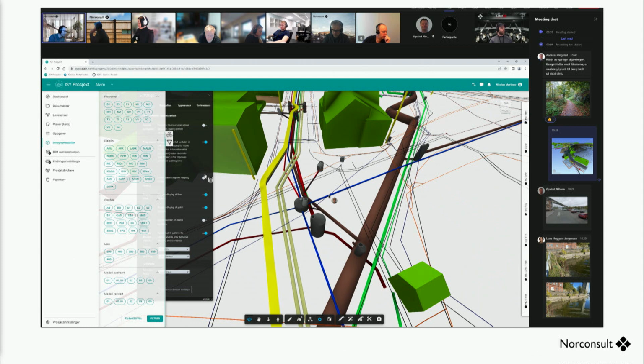These models are typically automatically updated every night in order to ensure that nobody's looking at old data, old metrics, a wrong set of information. And it's possible to break down and filter out the parts of the project that are discussed within the meeting. So every object in the BIM models contains information on what kind of work package they're related to, what contract they're related to. There's also a direct integration between the BIM and the bill of quantities and contract documents that are being made.